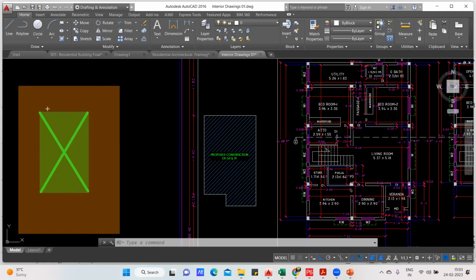So what we are supposed to do is, we should know the length of this and the breadth of this. If I multiply both, I'll get the area. That area itself will be my clearing area, and that area will help me to get the quantity. For that, I'll multiply by the rate. I'll get the total quantity that is required, or the total cost that will be involved here, right? Very simple. This much you understood.